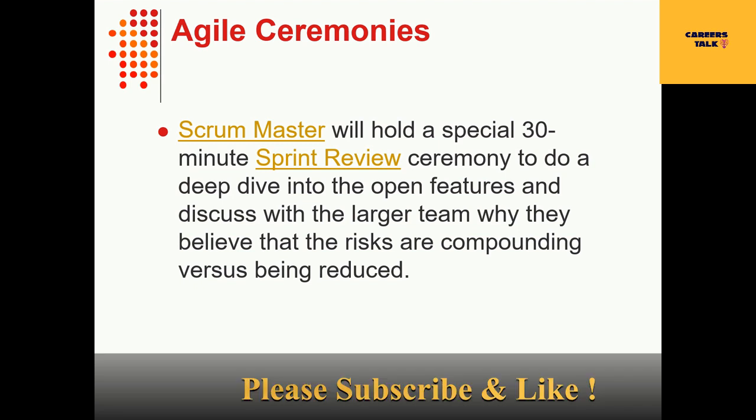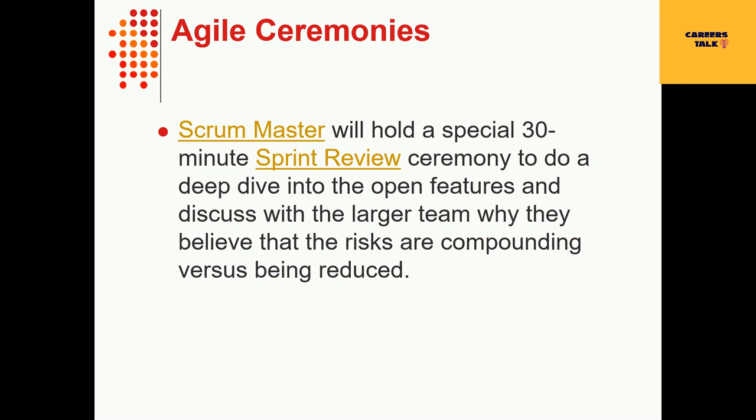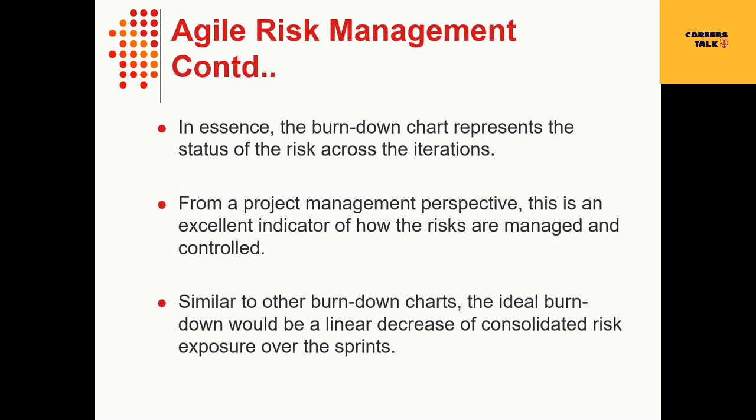The Scrum Master will hold a special 30-minute sprint review ceremony to do a deep dive into open features and discuss with the larger team why risks are compounding versus being reduced. This could be due to a lack of the right tools, hardware, storage, software, not having access to the right people, or overestimating velocity. The Scrum Master is responsible for managing the risk register and burndown chart, and all team members have a responsibility to pause a project if the complexity and number of risks increases significantly without explanation during the life of a project.